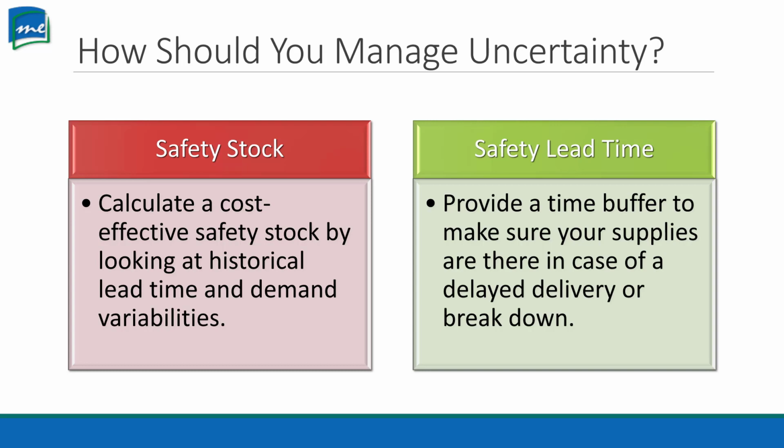So there's lots of different ways to factor safety stock. Some companies use a flat percentage, such as 3% or 5% or 10%. Other companies might say, okay, there's a safety stock, but don't order more than 2% of the overall price in safety stock. These numbers are based on historical data that you have, because the safety stock can help you with demand variability and the historical lead times for your materials.